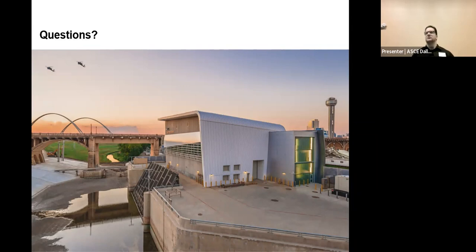During this morning's session, they had described some alternatives to soil modification. I wasn't quite clear what they came up with, and it looked like auger cast piles were also considered. Ultimately, what was the foundation consisting of? I believe it was the piles, like you said, but what we did with our geotechnical sub is we provided the conditions and what we thought was needed, and we allowed the contractor to dictate that design, because they're ultimately the ones out there doing the shoring. So the contractor, or whoever they hired, had to submit a signed and sealed shoring design and how they proposed to stabilize the pump station. We did have piers on the pump station itself, but the surrounding soils were dictated by their design. I forget which firm they hired, but it was a third-party source, and we had quite a few meetings and kickbacks on that because of what we considered.